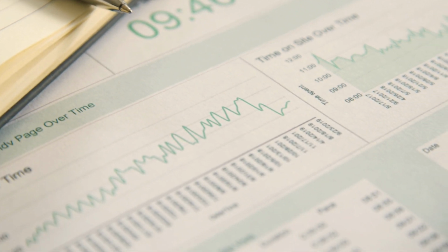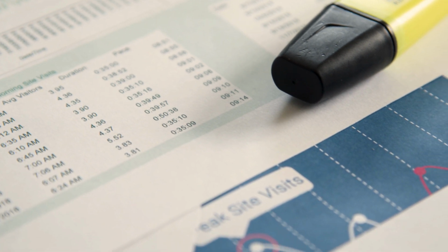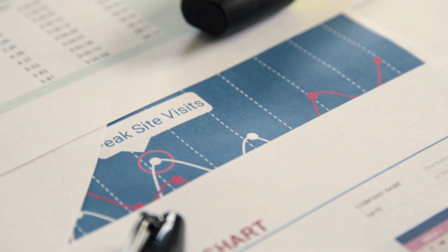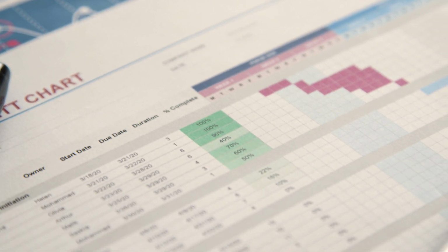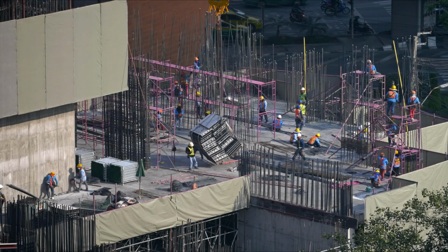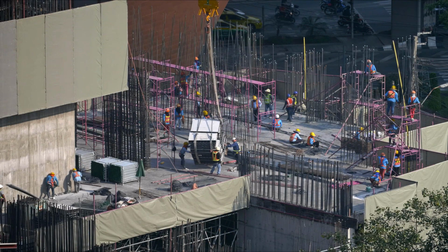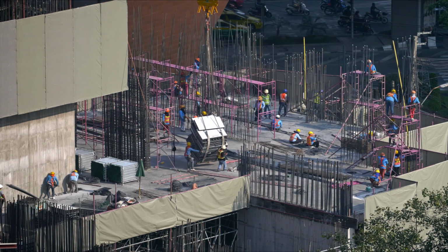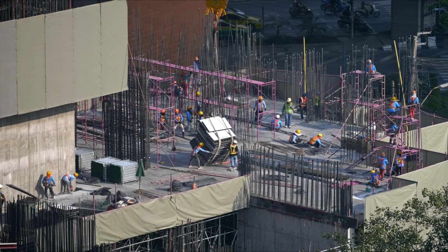At the planning phase, an architect creates the detailed design, builders confirm resource and time estimates, and suppliers agree prices and delivery dates, creating the project schedule. Once agreed and accepted by the client, you can then start by breaking ground. Essentially, the builder is then configuring known materials, concrete and bricks, and pre-assembled components such as windows and doors to realise those plans, all of which has to be done in a logical order.